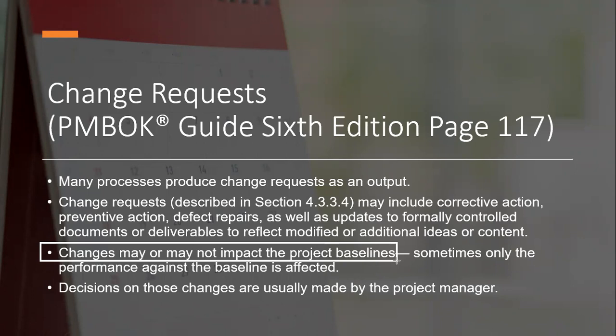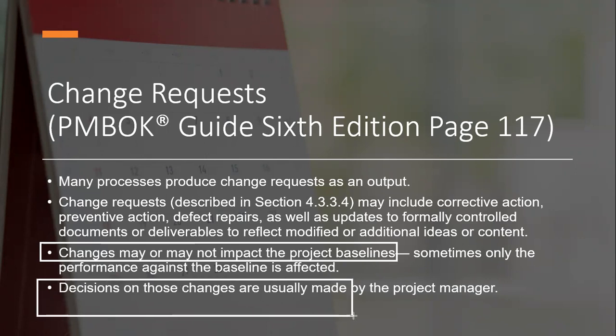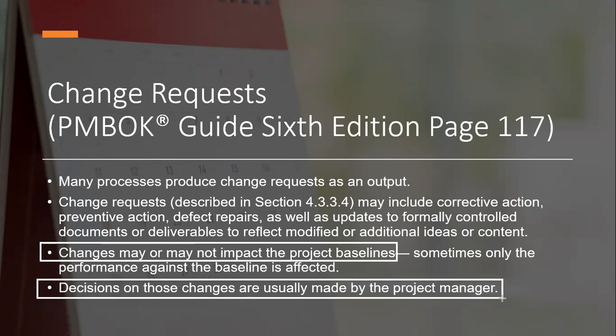Okay, and last but not least, it reads here, decisions on those changes are usually made by the project manager. So think about it. What they're saying here is not every change request needs change control board intervention. Some changes that do not impact project baselines, those change requests could be decided upon by the project manager alone without any further intervention from a sponsor or change control board, okay?